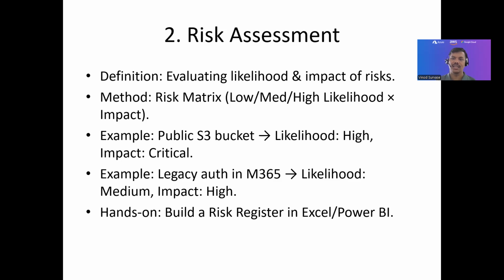So there are two parameters: you look at the likelihood and the impact of each risk that is there, even if those are configured correctly, because you need to do this to make sure your configurations, your system, everything is safe and secure, and you are not putting anything at risk, right? Methods include a risk matrix, with low, medium, and high likelihoods against the impact of those risks, right?